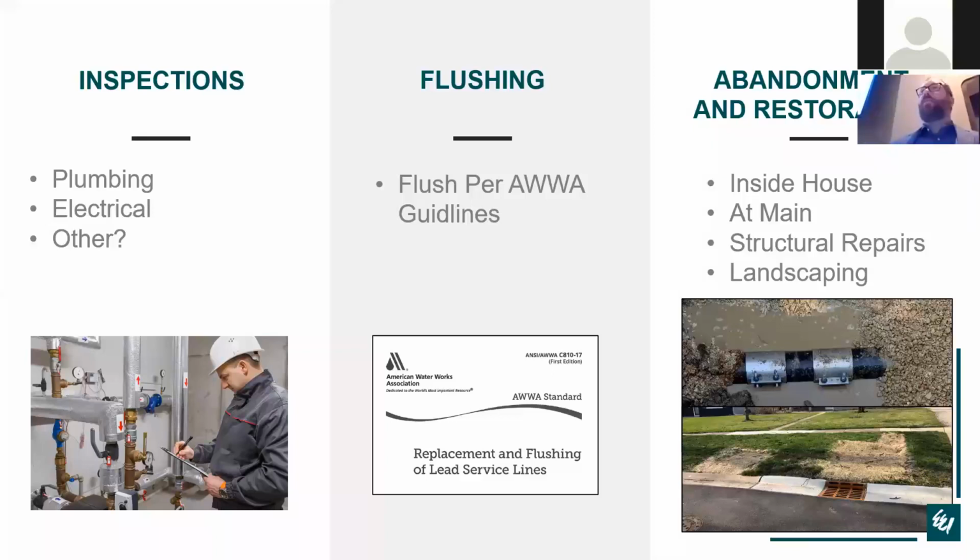And then at a minimum, like I mentioned earlier, structural repairs to the foundation are going to be required by the contractor. Whether that's patching a foundation basement wall or the slab, at a minimum, those need to be done. And then any other repairs that are maybe aesthetic that were determined earlier that are going to be on the contractor also need to be completed. And then you go out to the outside of the home and you have the landscaping complete.